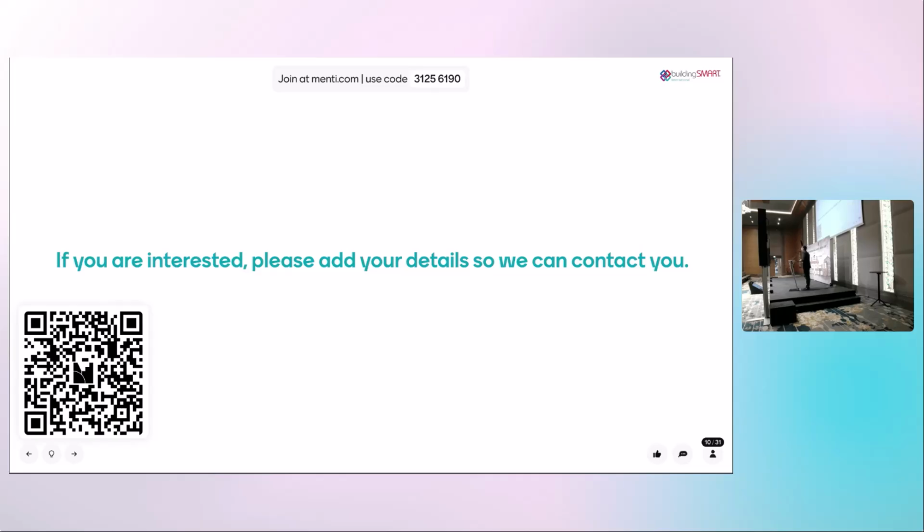Maybe more of a comment or maybe a question, I'm not sure. I work for Schiphol Airport, so I'm a client, and we are experiencing issues with handover, very common, but we do require IFC files to be delivered. We also have a very clear set of information requirements throughout the whole life cycle, but our challenge is that not all of the asset requirements are in the IFC file, so what do you check when you are doing the checks that eventually lead to handover?